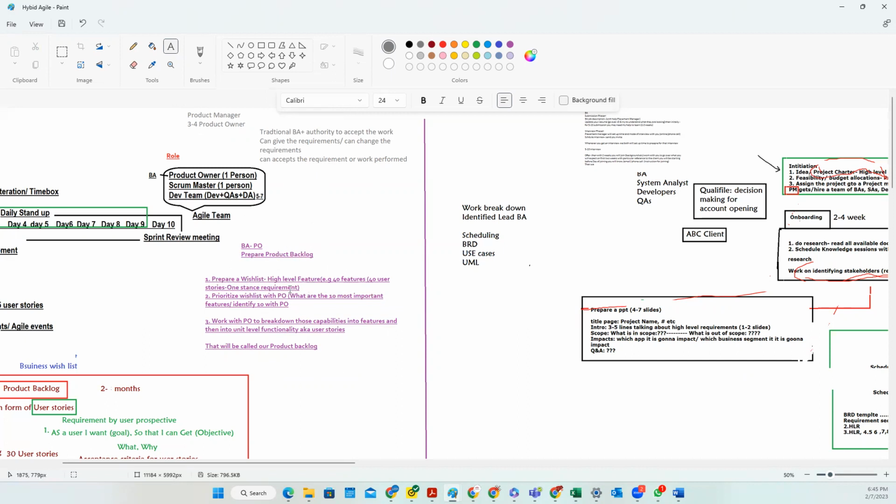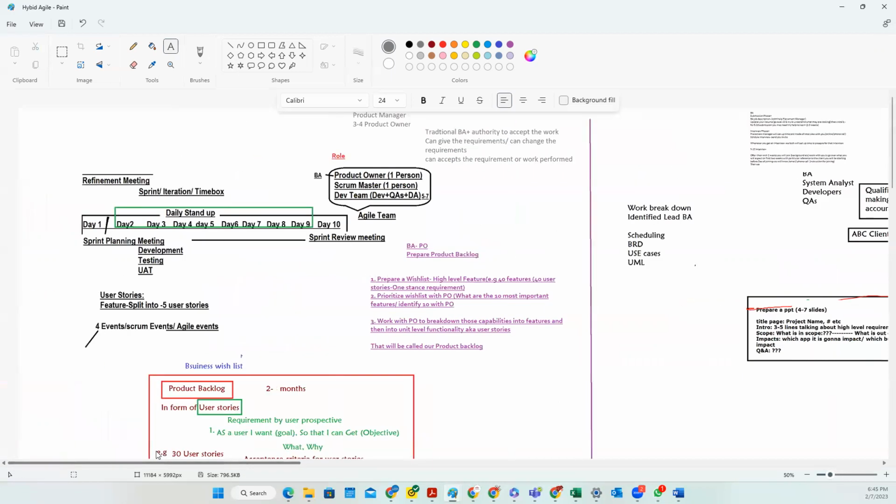Then out of those 20, they will distribute: hey, product owner one, your team will build these 5 features, and product owner two, your team will build these 5 features, and product owner three, your team will build these 6 features. Okay, they distribute, and then those three product owners will go to their teams. So one product owner has one team. Okay, so one team means an agile team.